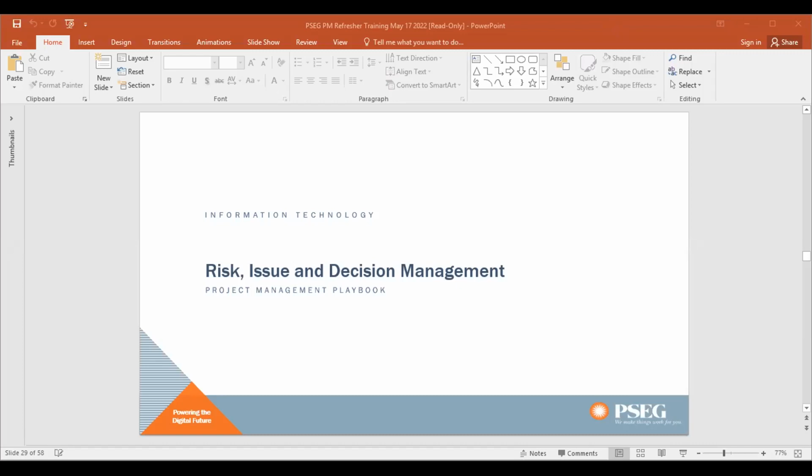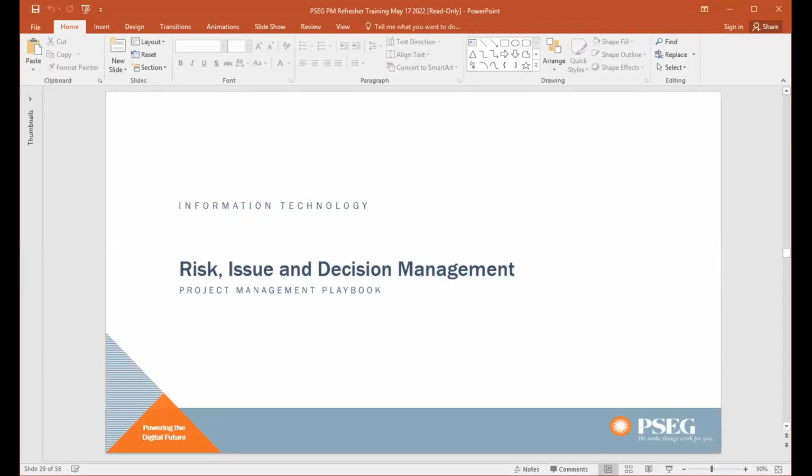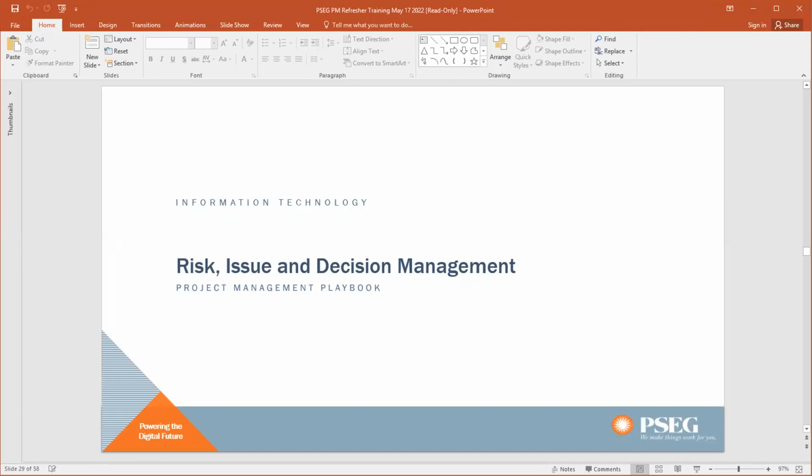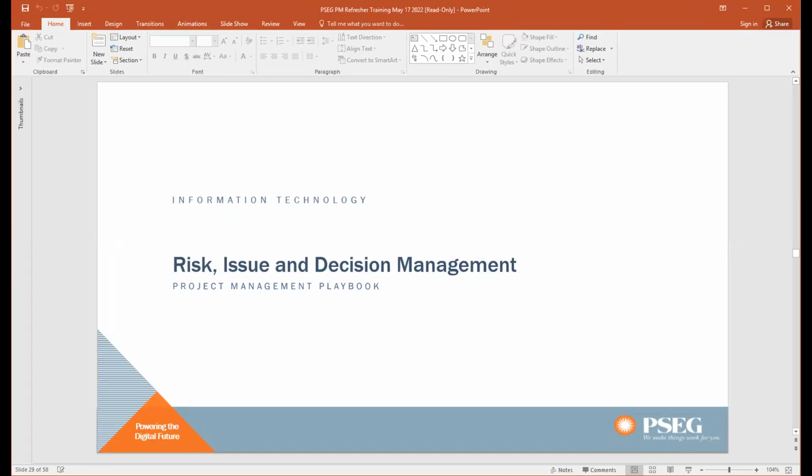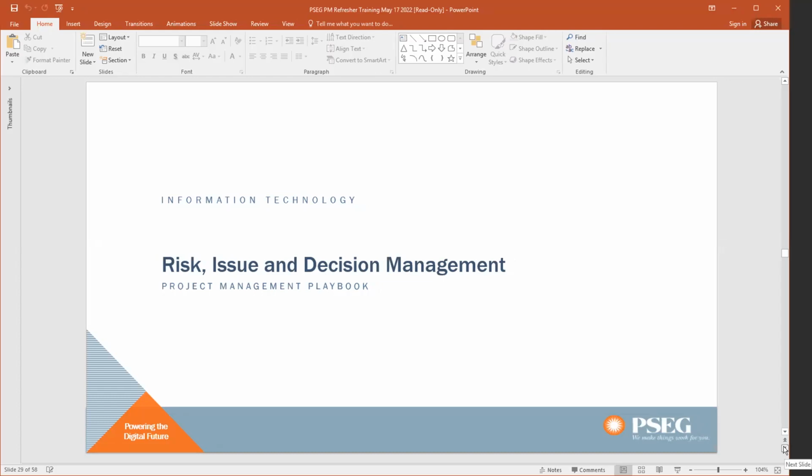Good. So just wanted to give some tips to the project managers that finish your status reports on time with all the details that you want to present your project for. Okay, if your project is in red, there is nothing to feel bad about it. Red is another status that we want to present to the senior leadership team, but we should have a proper plan to come back to green, right? So present all these things. Why it is in red, what are you doing to bring it back to green, and then if you need any special help from the senior leadership team, present it over there.